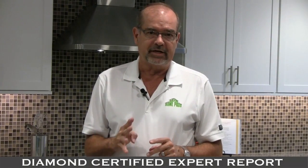Thank you, Andrea. The fourth way you can help is by minimizing changes. I understand that sometimes changes are unavoidable, but invariably changes result in delays and increased costs. So let's review. Tip number 1, read your contract. Tip number 2, avoid verbal agreements. Tip number 3, make design decisions early. And tip number 4, minimize changes.